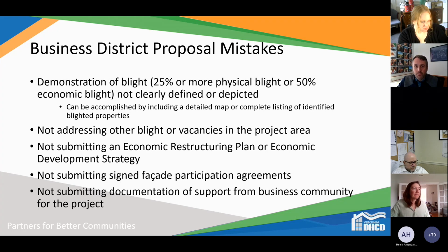The big thing, again, is that facade improvements are the bread and butter of a business district revitalization project. So if you don't have agreements and or thoughtful ideas for those improvements going in, appropriate costs for how much it's going to be for those facades, and agreements from the owners to participate, the program's not going to move forward. We have some projects currently that had great intentions, but when you get down to it, the business owner is not in agreement. So if you have thoughtful conversations up front, you can hopefully move the project forward quickly.